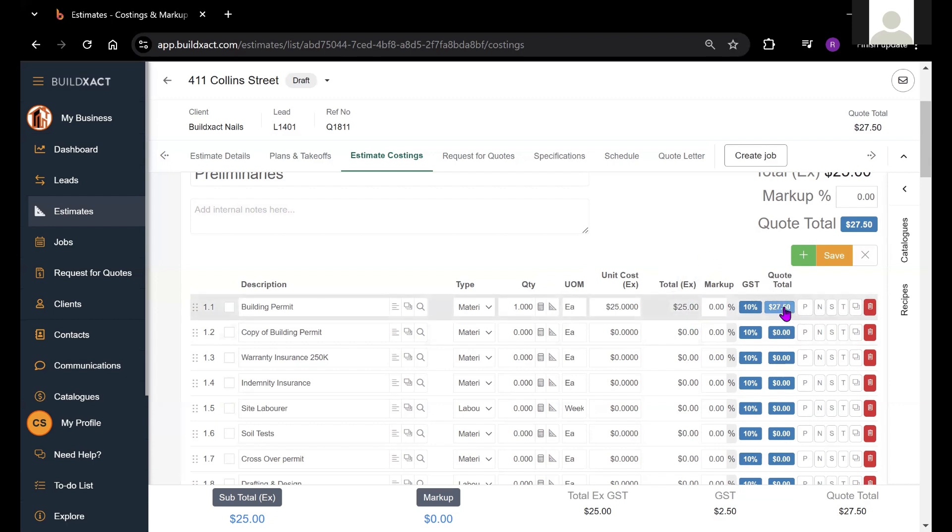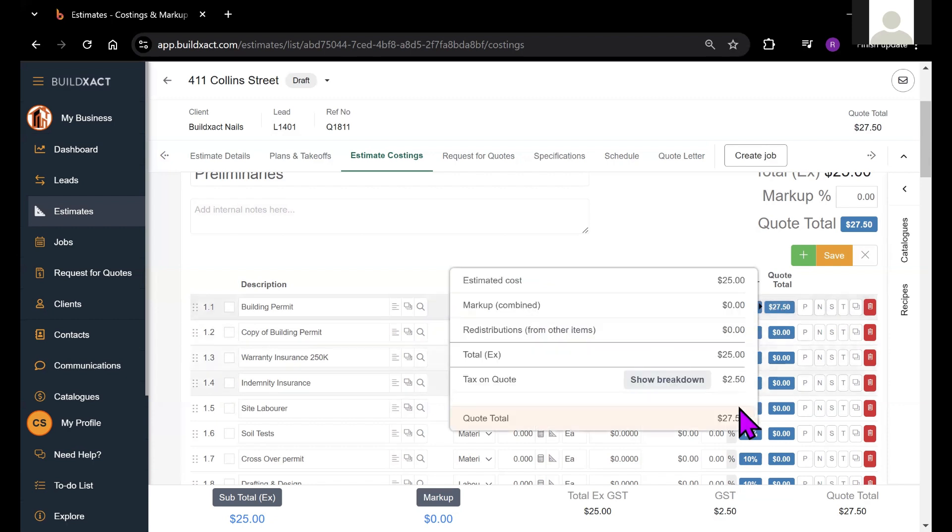And finally, the quote total section here will show you how much this is costing the customer and BuildExact is adding on 10% GST.